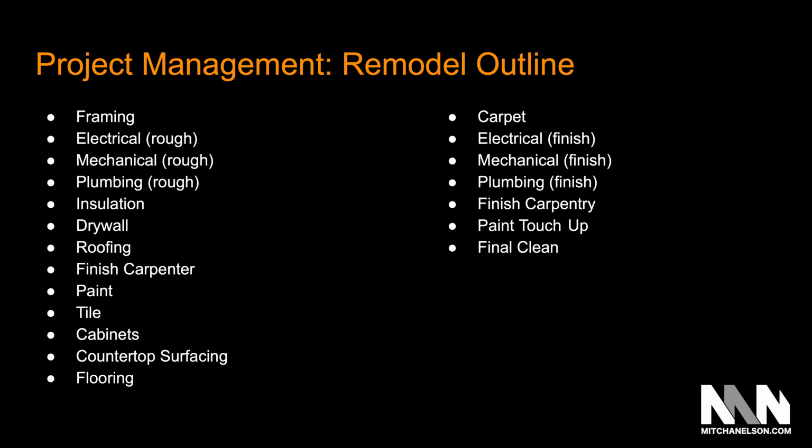Your finish electrical, which is going to be like your outlets, your light switches, your light fixtures, light bulbs, etc. Your finish mechanical, which is going to be your vent registers that go in the wall or in the floor and the ceiling. Your finish plumbing, which is going to be your faucets, your drains on sinks, etc. Your finish carpentry, they're coming back just touching up, making sure that they patch any holes that were made in the walls by other contractors that were in there. Then your paint touch up, and then your final cleaning.